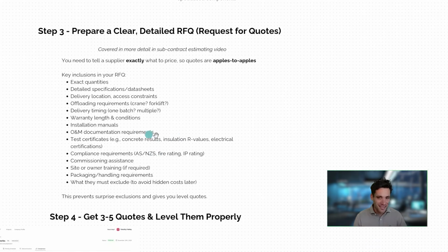Are you requesting installation manuals? Do you need them to prepare operations and maintenance documentation? In some instances, for special products, depending on your contractor requirements, you might actually have to get training from the supplier to provide to your client. Do you need FAT testing, different types of test certificates? What are any compliance requirements you're responsible for? Do you need them to actually help with commissioning assistance?